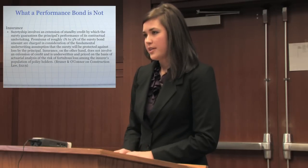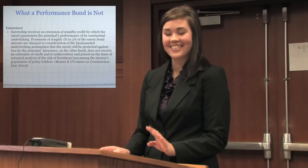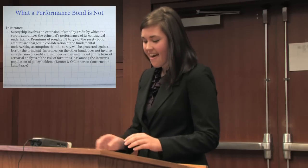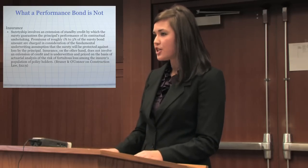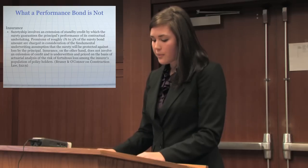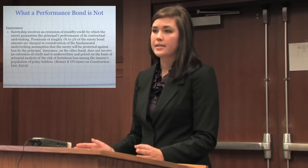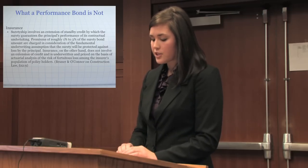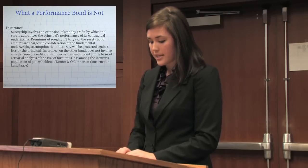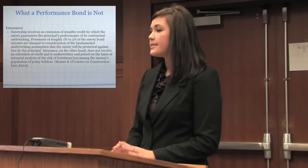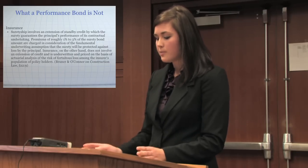A performance bond is not an insurance policy. An insurance policy has two parties — the insured and the insurer — and the insurer will pay the insured for any loss sustained due to a predetermined set of circumstances. However, in the surety agreement, there are three parties: the obligee, the principal, and the surety. The surety agreement extends safety credit in case performance is not completed, so it protects the owner by ensuring that performance will be completed.